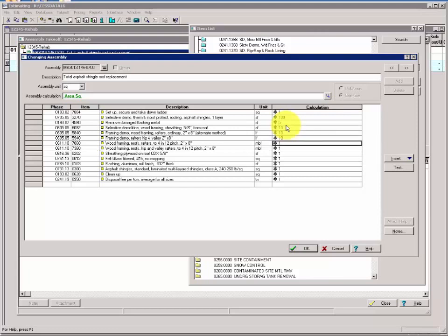The conversion for 1,000 board feet in terms of replacing it will be a number 0.016, and for the hip and valley would be 0.013, as one is a 2x8 and a slightly different version in the hip, the 2x8 hip. The sheathing will be 10 square feet per square, so we'll use a 10 here, and we're back to squares on the framing itself, so we just keep the asterisk 1 here.